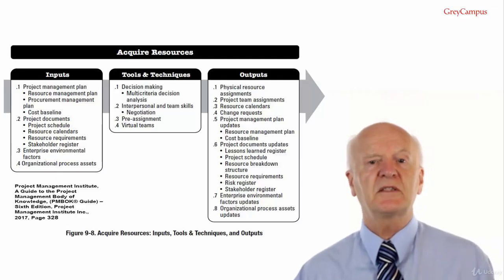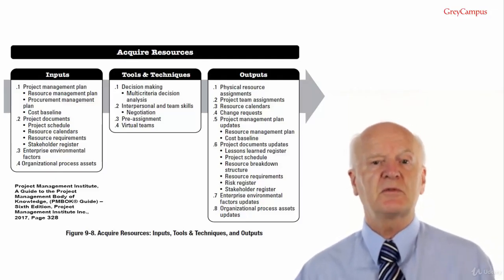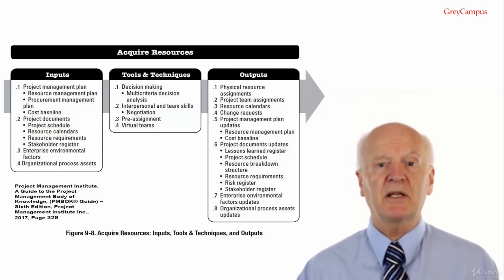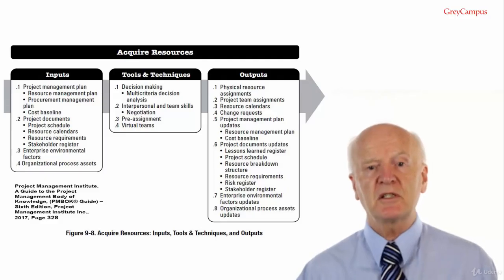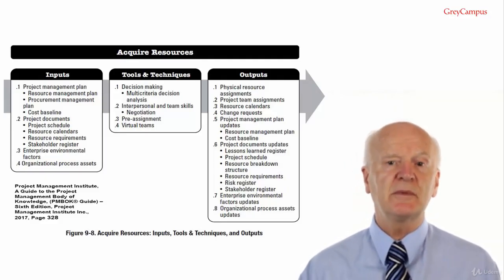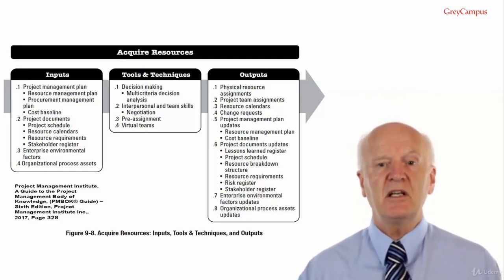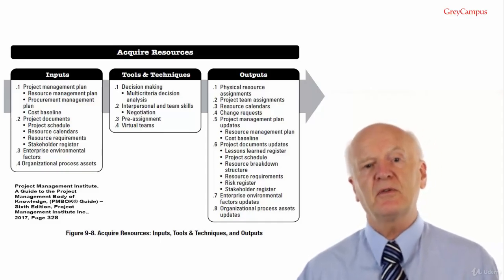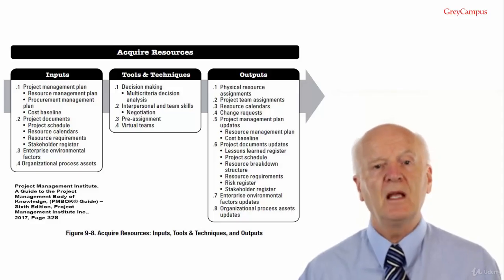Output number 4, change requests. When changes occur as a result of carrying out the acquire resources process, for example impacts to the schedule, or when recommended corrective or preventative actions impact any of the components of the project management plan or project documents, the project manager needs to submit a change request. Change requests are processed for review and action through the Perform Integrated Change Control process.